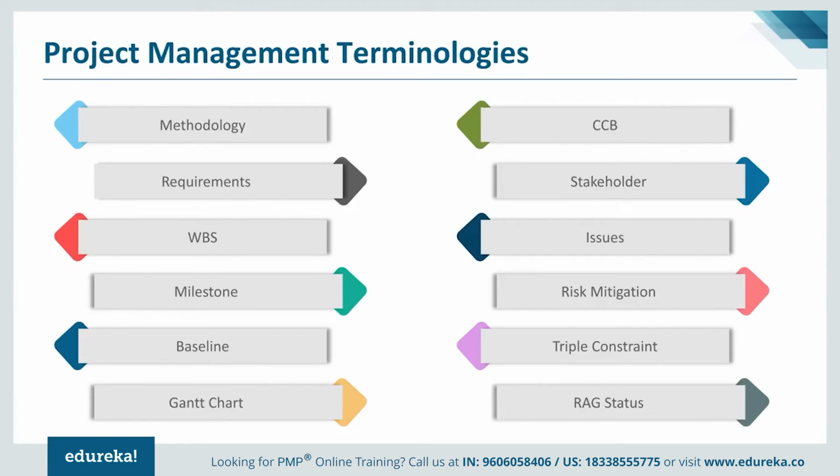Then all the stakeholders come together and ascertain, if we implement this change at that stage, what will be the impact on the schedule of the project, the budget, the overall risk, whether risk will go up, the resources, etc. Once they understand the impact of that change, they decide whether to approve or reject it. So the change control board is where the fate of the change is decided, in a way.